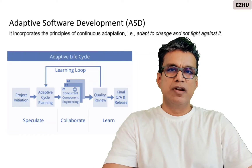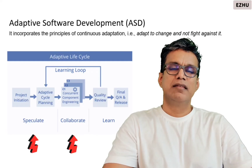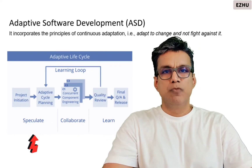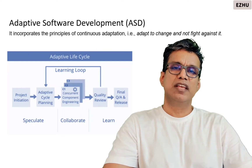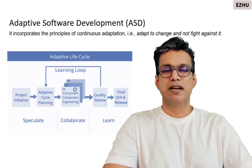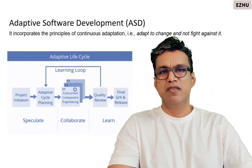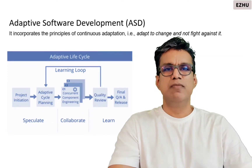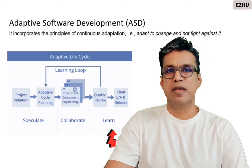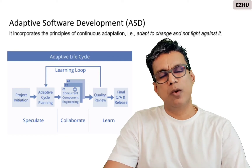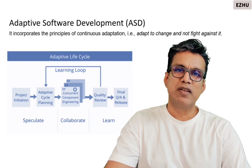The Adaptive Software Development framework is based on the principle: adapt to change and don't fight against it. There are three main stages. The first stage is speculation, where the different teams discuss the key goals and objectives of the project, the key features to be developed, and the limitations and risks. The second phase is collaboration, where teams come together and any learning is shared across teams so that others do not need to learn it from scratch. The last phase, the learn phase, is very important — lessons learned, what went well, what did not go well, all positives and negatives are captured, which is going to be useful for the effectiveness of the project.